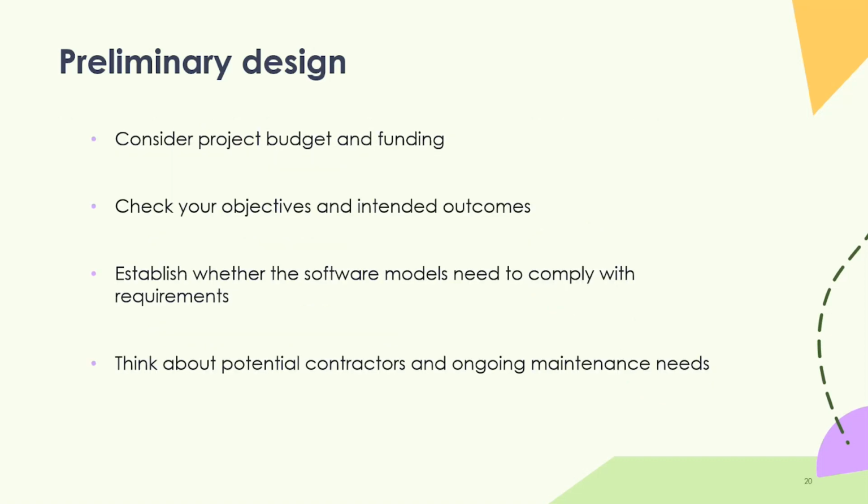The other part to think about is that budget, as I mentioned before. You might have financial plans in place where you have a set budget between 2025 and 2028. So work out what that budget is, and then based on that budget, how many homes can you put forward, given the analysis you've done to see how much it's going to cost for those target properties to get them to an EPC Band C, for example.